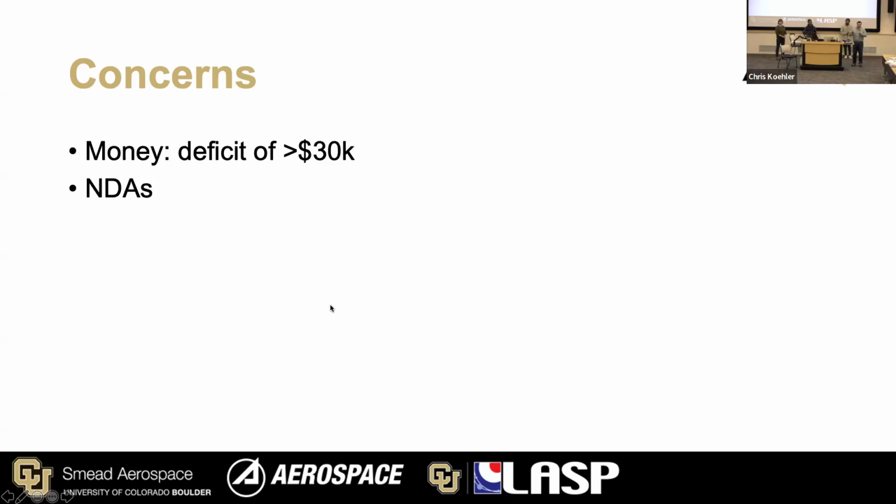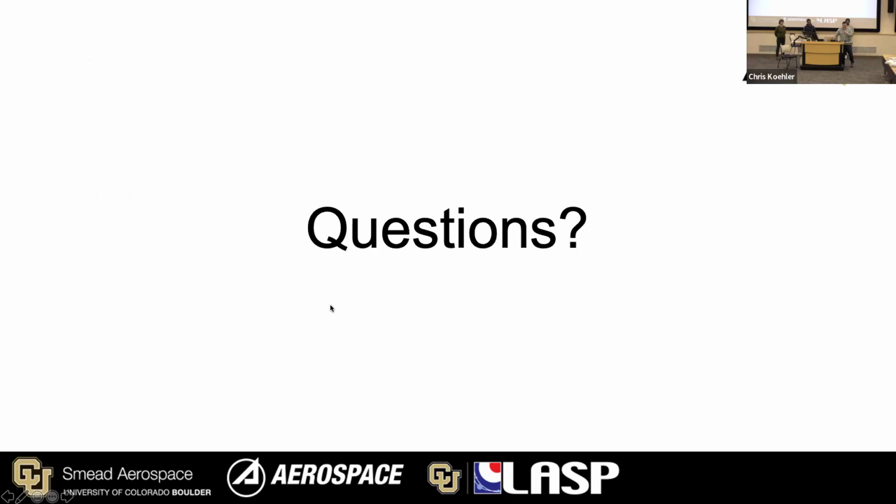And then acquiring NDAs, we're not allowed to sign NDAs on behalf of the school or a project as students, but a lot of companies require NDAs for detailed documentation and even purchasing components. So those are the two biggest concerns that we have going forward. And that's our presentation. Do you have any questions?